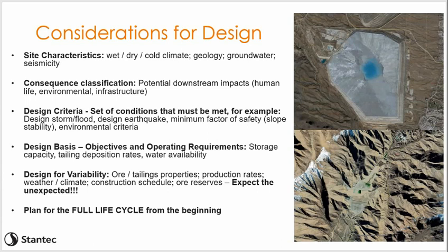And this last element is huge, and this is something that hasn't always been the case in this industry: planning for the full life cycle from the very beginning of the project. That means that mining companies have to be able to prove that they're capable of closing a facility before they open it.